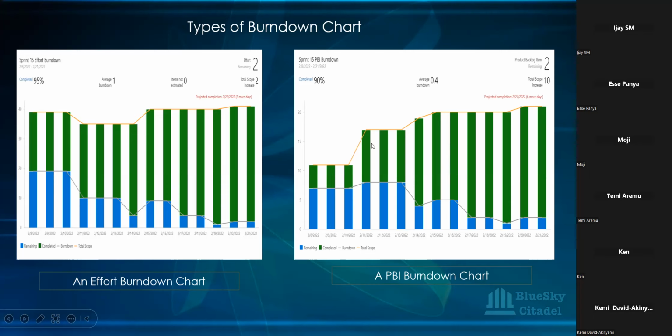Until a story gets to done, you won't see it turn green. The developer might have worked on it, and what was delaying it could be UAT, but until it gets to closed on your main board, it doesn't turn green on your chart.